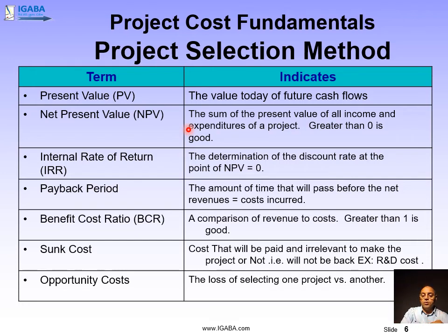So they will ask, at the point when we recovered all our investments, what is the rate at which we are recovering our investment? To give you a simple example, if you expect to recover your investments in 4 years, that means that you have recovered on average 25% of your money annually. That's putting it in very simple terms. And of course, the higher the IRR, the better, the more attractive the business opportunity is.